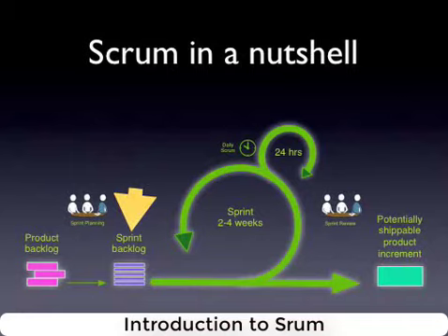What now happens is that finally, after all these processes and preparations, the real work has to start. Real in quotes, because that is also real work, but I digress. Now the programming starts, the development starts. The sprint starts, and once this meeting is over, the deal with the product owner or a client is that the sprint backlog cannot change until the sprint's end.